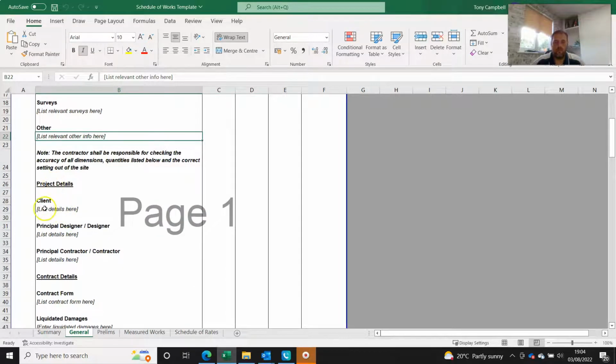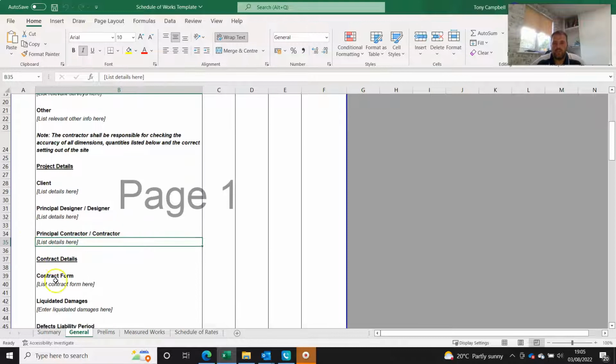Okay, so then the project details, you enter the client's details here, and that's the name and the company. Again, the principal designer, so the person who's responsible for the project in the pre-construction phase is the principal designer, and you'll put their name here. The principal contractor, you're not going to know that yet when you're going out to get a price. So usually we put TBC, and then that gets overwritten with the name of the successful contractor.